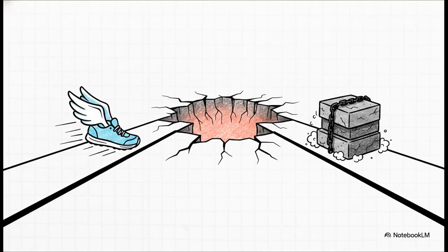The single biggest overarching risk occurs right where these two life cycles collide. We call this the language barrier and the dependency trap. If your software engineers are sprinting ahead in Agile and your infrastructure executives are slowly plotting out physical upgrades in Waterfall, and they simply assume the other is on the exact same schedule just because they both said they're following the SDLC, man, you are walking into a costly disaster. You can literally never ignore the macro system for the micro software.